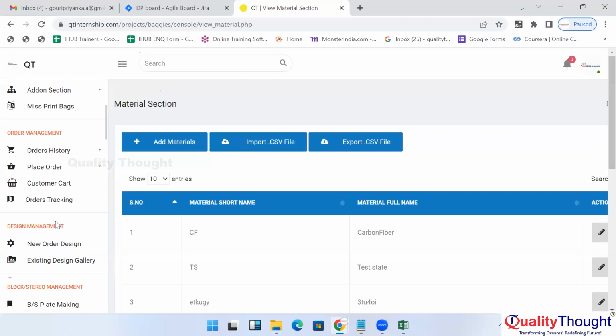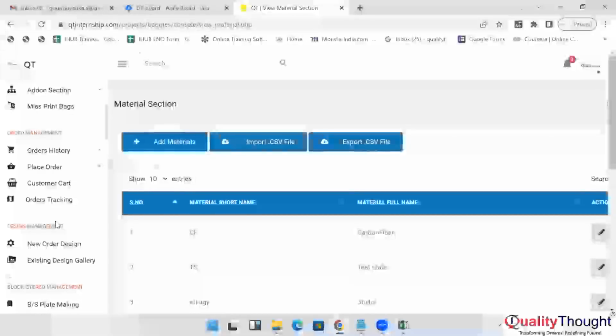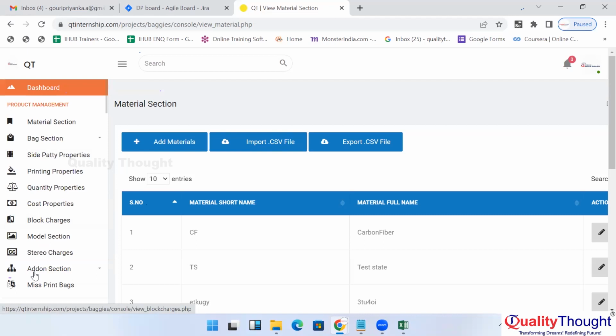And I hope you know about the culture of IT people. They work sprint-wise, and sprint-wise they give the release, right? The sprint duration is 2 weeks, mostly 2 weeks, in very rare cases 4 weeks. Okay, 2 weeks means just 10 days. So within 10 days, tell me, can we perform all these submodules, which include product management as a main module? Can we deliver this entire module? No, right? So here they mention product management is an epic.